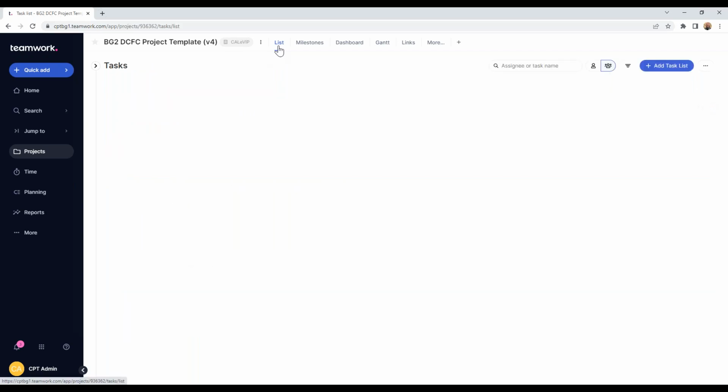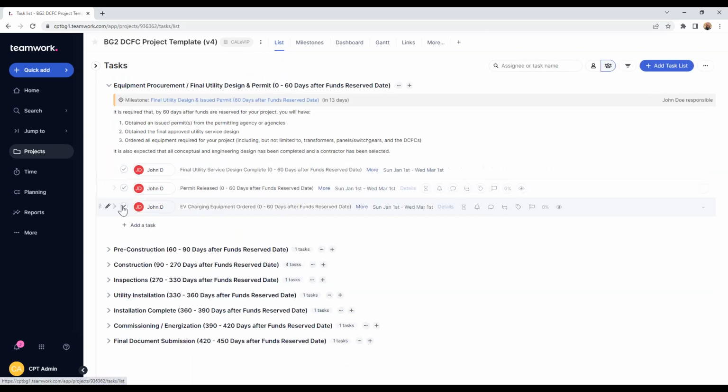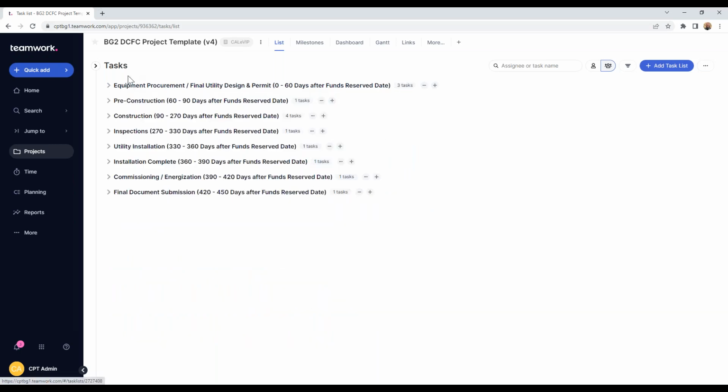You can do that for tasks. You can do that for milestones. Again, I will reiterate, none of these changes in dates will change the ultimate 450-day timeline. And in fact, if they're taking longer, it'll mean that other things need to happen more quickly at the end of the project as things go. If you do need an extension, we have an extension policy where you can formally request and get that approved.